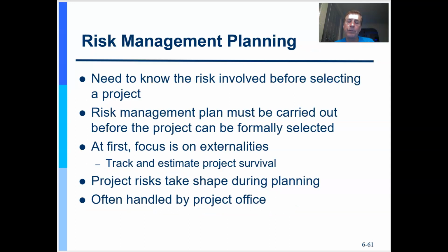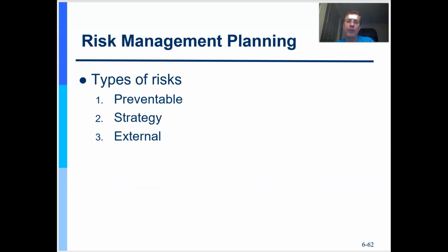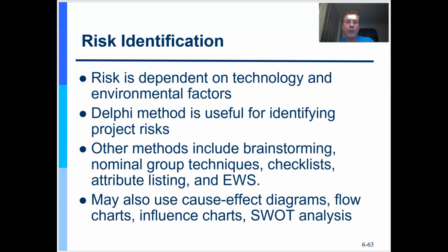Okay? And so in risk management planning, it's the how I'm going to manage risk. I'm going to define my qualitative and quantitative approach up front. I'm going to define my contingency reserves, my money I can set aside to address these risks. I'm going to create a matrix that prioritizes the risks. I'm going to nominate risk owners, these sort of things. And so with risks, they can fall into general categories listed here and described further in the reading.